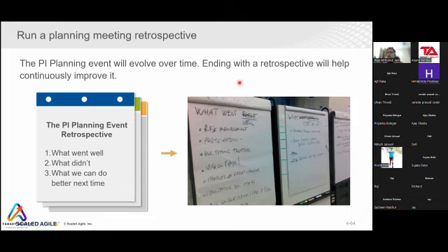When it comes to owning the risk, you assign the risk owner: this particular person, the product owner, or this developer will own this risk and he is the risk owner. He has the responsibility to manage that risk. So that is owned. Accepted risk is when I can't do anything. If the risk happens, I have to accept the consequences. Nothing can be done. You identify this risk as an accepted category. For example, one key resource leaves the company. What can you do? You have to accept it. You can't do anything. That is the acceptance of risk.